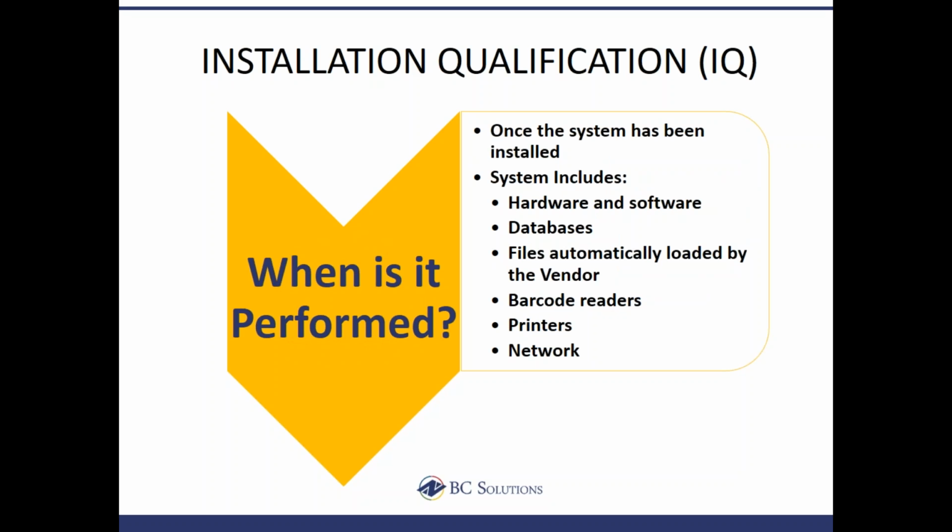When is it performed? Well, once the system has been installed, that's when you're going to qualify the equipment. That would include, as I said, hardware, software, databases, any files that get loaded by the vendor, barcode readers, printers, and network. So this is before you even begin any other validation, because the fact is, and actually some of us, me included, have found this out the hard way, that if you don't install your equipment and validate it,